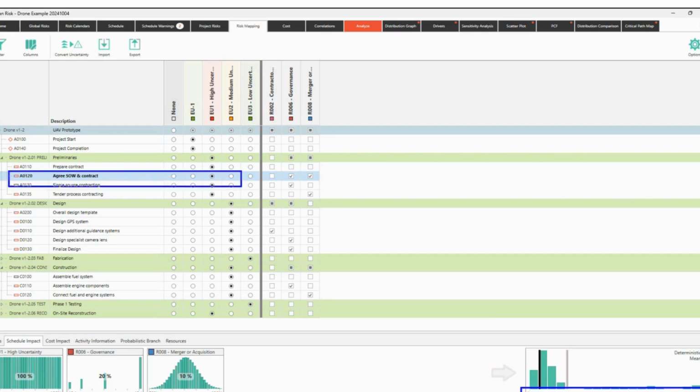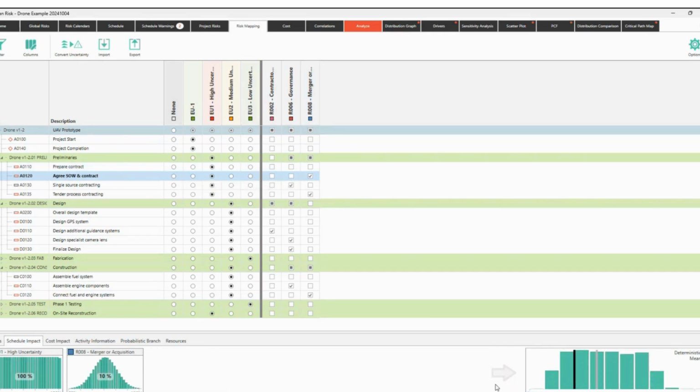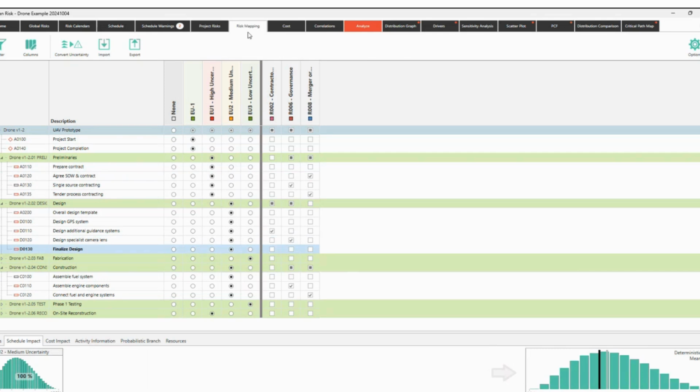And we're talking about the scope of work. Can this be real or not? That's the nice thing about this, that you can have a previous simulation where the simulation is going to tell you if this can be real or not. Let's say this is too much. So what happens if I take out the governance risk? Take a look, from 7 to 18 days. So perhaps the governance risk is very, very high.